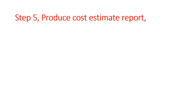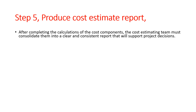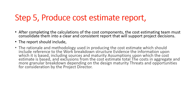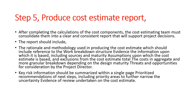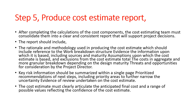Step 5: Produce Cost Estimate Report. After completing the calculations of the cost components, the cost estimating team must consolidate them into a clear and consistent report that will support project decisions. The report should include: the rationale and methodology used in producing the cost estimate, which should include reference to the work breakdown structure, evidence and the information upon which it is based, including sources and maturity; assumptions upon which the cost estimate is based; and exclusions from the cost estimate total. The costs should be presented in aggregate and in a more granular breakdown depending on the design maturity, along with threats and opportunities for consideration by the project director. Key risk information should be summarized within a single page, with prioritized recommendations of next steps, including priority areas to further narrow the uncertainty and evidence of review undertaken on the cost estimate. The cost estimate must clearly articulate the anticipated final cost in a range of possible values reflecting the confidence of the cost estimate.